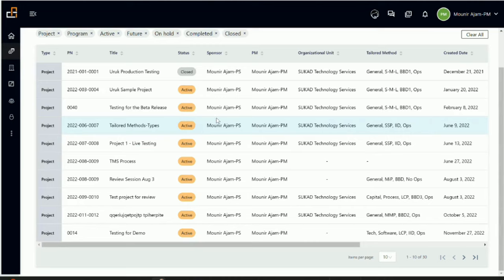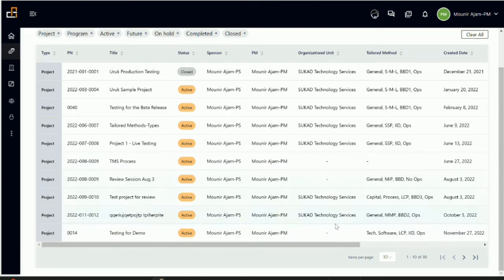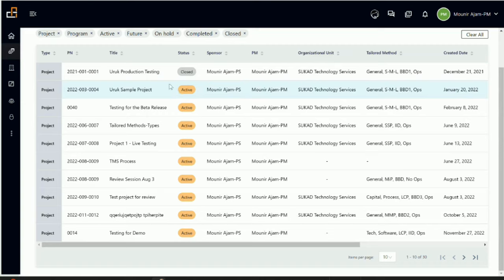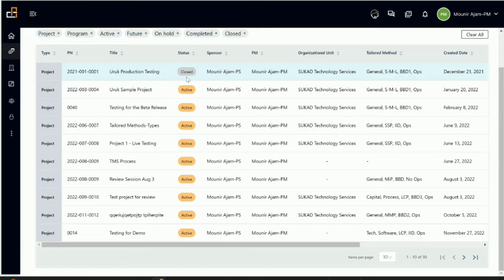Now, in addition to that, we have three other statuses. Sometimes you might have an active project, and the sponsor might decide to put it on hold. I don't think I have any project on hold in here to show you, but it will be basically in the status column here. It will show on hold. And when the project is completed and we go into the PLT closure and we approve the last stage gate in the PLC stage—the PLT closure stage—then the project would be flagged here as completed.